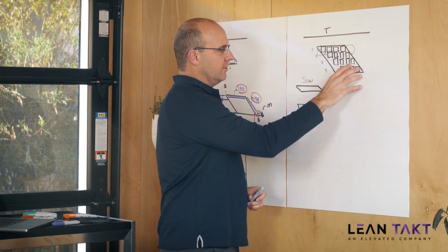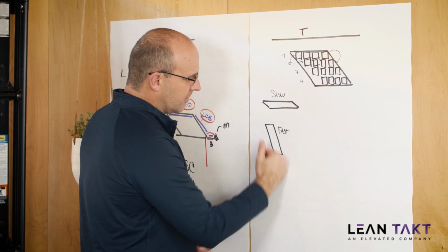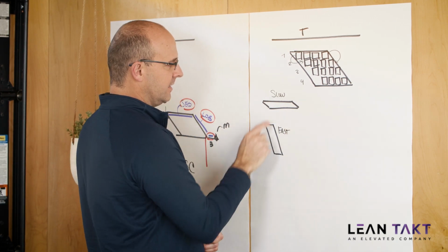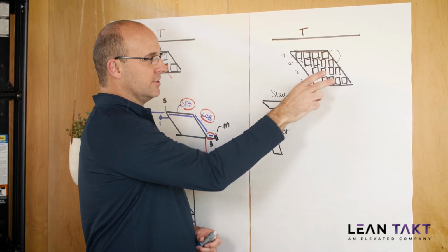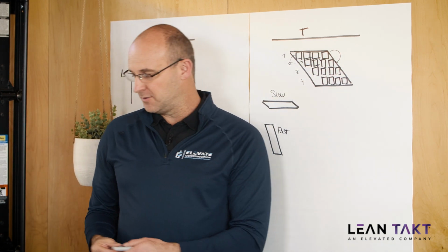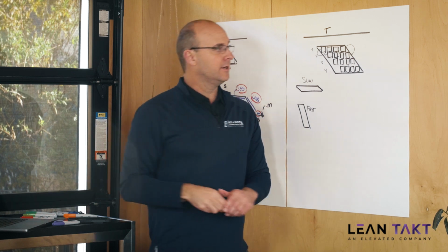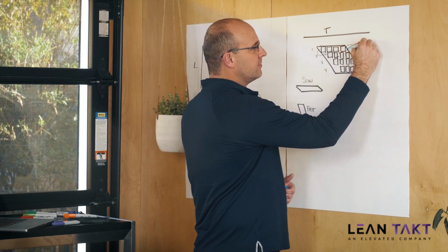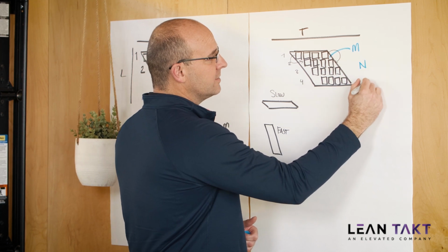So that's a ratio. If you see the distance of a phase be longer in the vertical versus the horizontal, that means the train was going faster than time was ticking by. This one, the train was going slower than time was ticking by. So the shape really indicates how fast the train is going. So here's what I want to explain. On our projects with LeanTakt, we always say, what is your macro realized flow potential? What then is your norm, and what is your backup?